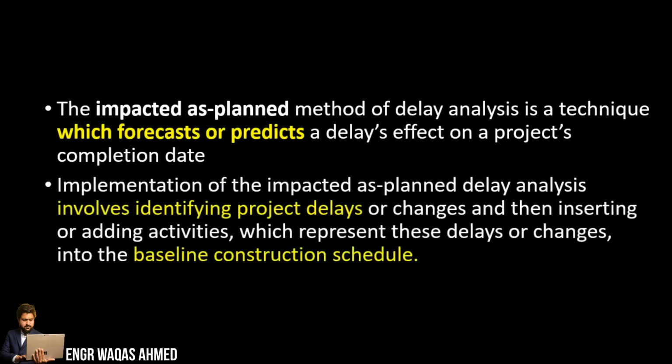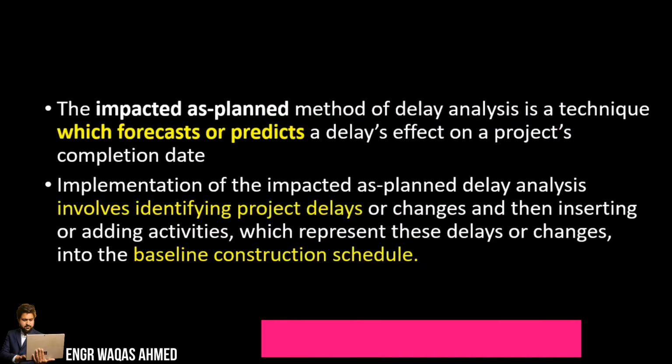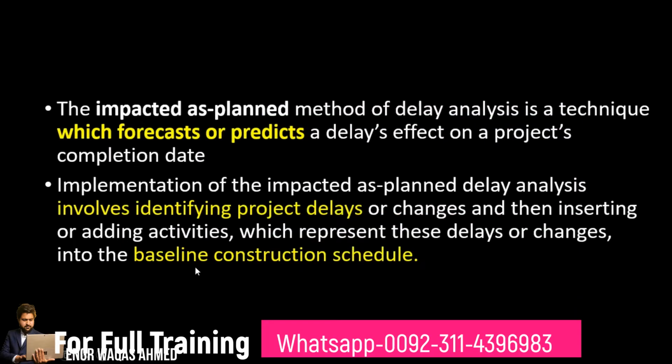So what we have to do: implementation of the impacted as-planned delay analysis involves identifying project delays or changes and then inserting or adding activities which represent these delays or changes into the baseline construction schedule. So what is the most important thing? You need one baseline construction schedule which is compiled during the planning phase. That is the recipe for this methodology. First, you need the baseline construction schedule.